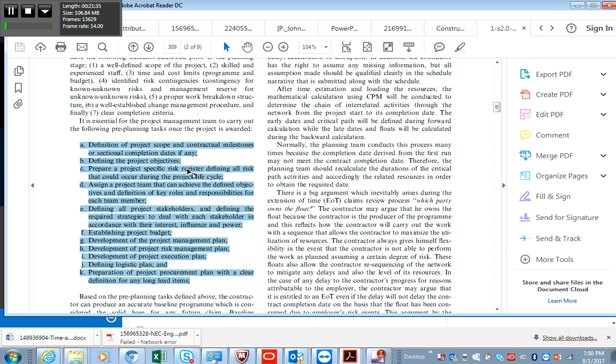Okay, so you as a project team will define all of those standards as defined obviously by the scope of works. So the reason why you've gone for prevention is, if you look at any quality aspects of any projects that you're on, usually in a program, and this will relate to every single planner, you need to build your quality into the program. Why do I say that? Because when you define your activities, any activities that require a check, i.e. a sign off, you have to put a QA check activity in the program. Why is that? An inspection test plan is a QA check.